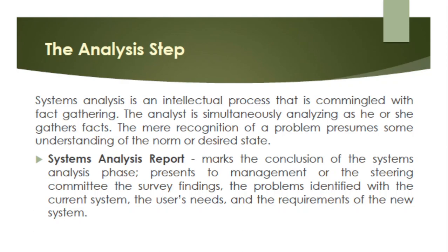So as mentioned a while ago, the deliverable for your analysis step is your systems analysis report. So this marks the conclusion of the systems analysis phase. It presents to management or the steering committee the survey findings, the problems identified with the current system, the user's needs, and the requirements of the new system. So this document, or the systems analysis report, constitutes a formal contract that specifies the objectives and goals of the system.